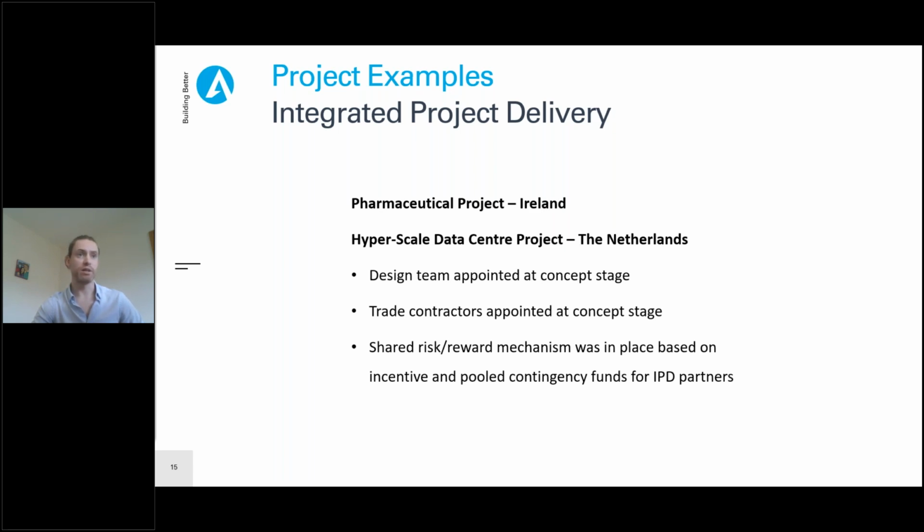It was suggested by the client that early contractor involvement reduced the schedule by 3 months for the pharma project by removing the tender process, and a further 3 months by engaging the contractors early to assist in the design, thus removing the need for detailed contractor design after the early contractor involvement phase and during the construction phase. Constant clear communication, led by the steering committee, where contractors were involved, formed a collaborative culture that resulted in true cooperation.